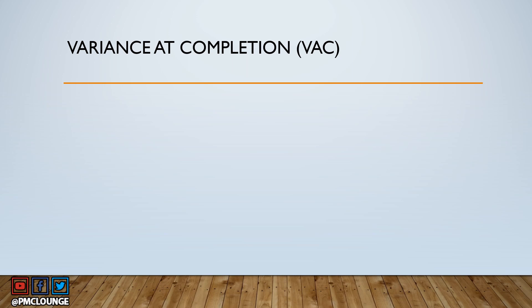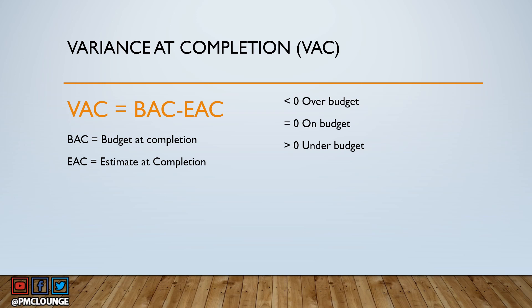Variance at Completion, or VAC: VAC equals BAC minus EAC, where BAC is Budget at Completion and EAC is Estimate at Completion. This tells you the difference between your budget and your estimate at the completion phase. If VAC is less than zero, you are over budget — bad news. If greater than zero, you are under budget — best news. If equal to zero, the project was completed exactly on budget.